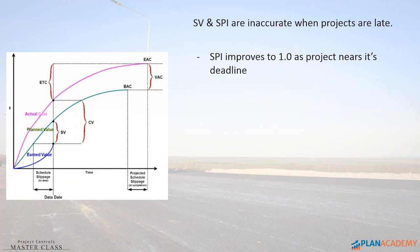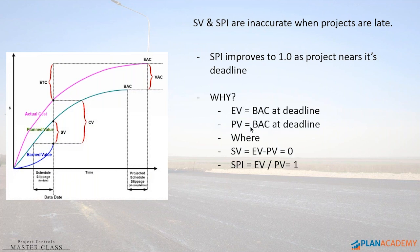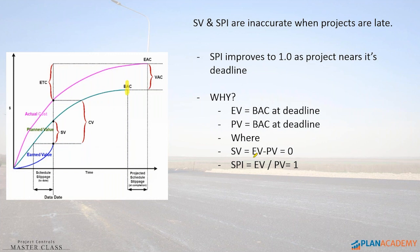Why does it do that? Let's look at the equations really quick. Your earned value line always ends at budget at completion. That's because the calculation for earned value is budget at completion times some percentage. So earned value goes from zero but always ends up at your budget at completion at the deadline. Planned value does the same thing — it also ends at budget at completion at the deadline. So at the deadline, your schedule variance equals earned value, which equals budget at completion, minus PV, which also equals budget at completion. So they equal the same thing, and your schedule variance is zero.